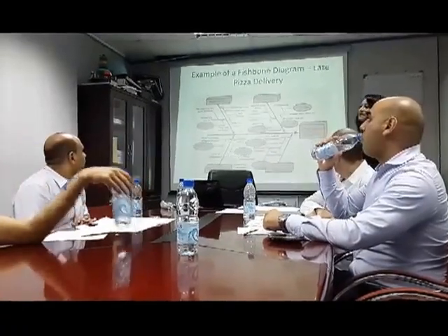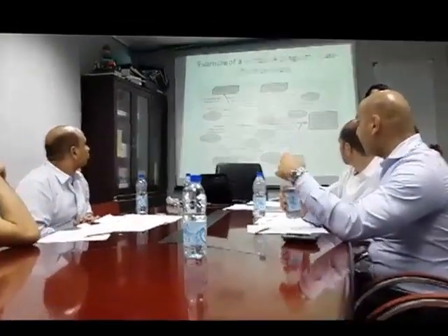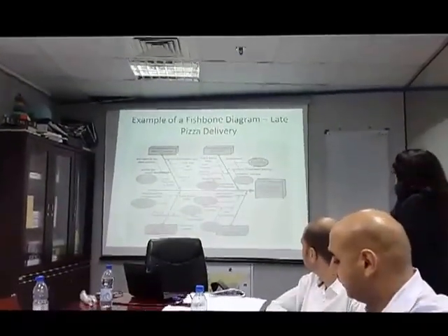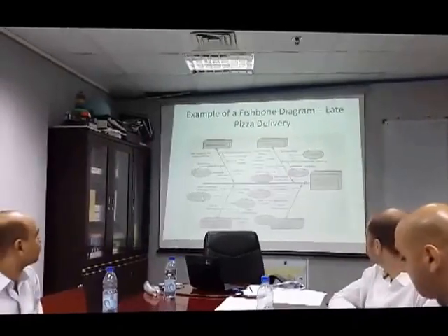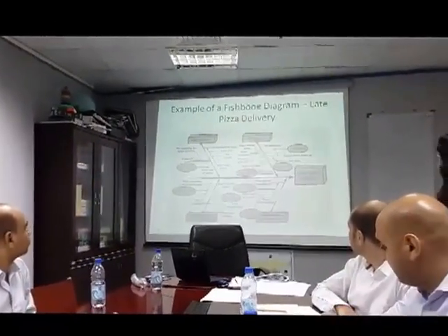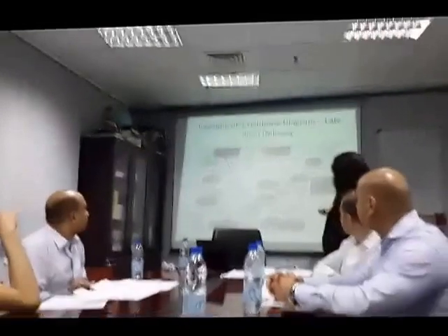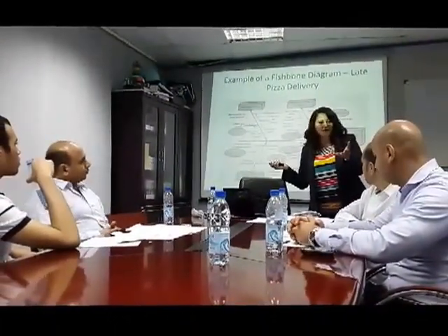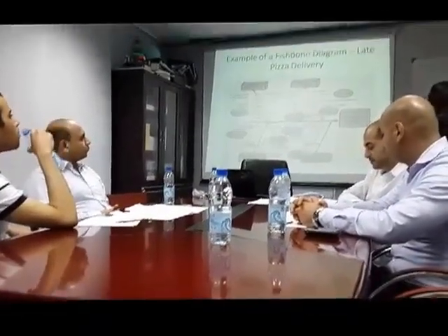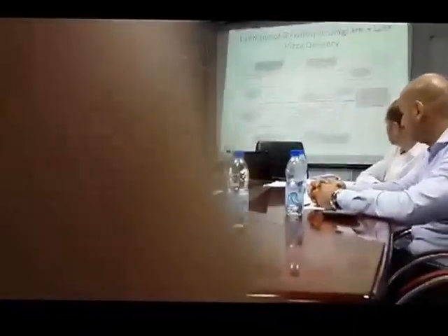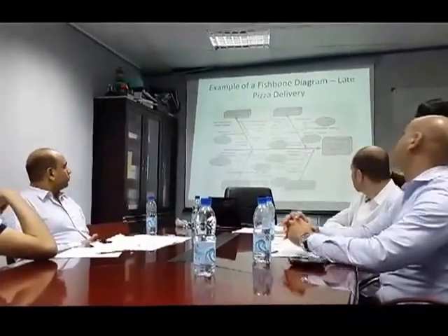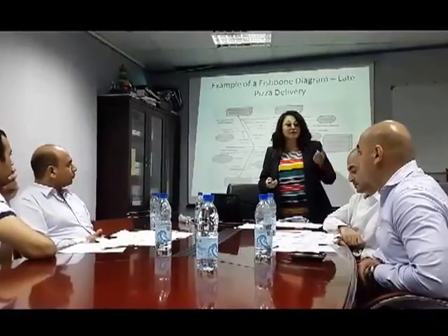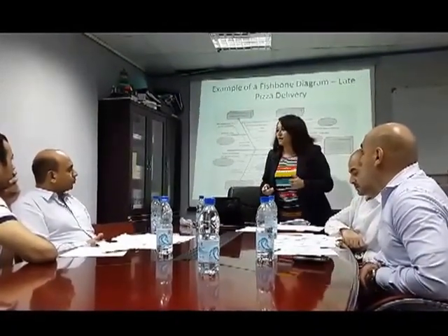And what do you see as being the cause of most of the problems? The things that are in the circles, what are the causes here? No training, high turnover, poor training, high turnover, lack of training, high turnover. So really, the highest one, the most frequent one is the training, right? Is it the training or the turnover? Let's see. It's the training. So we have identified the cause of the problem. Either poor training or no training.